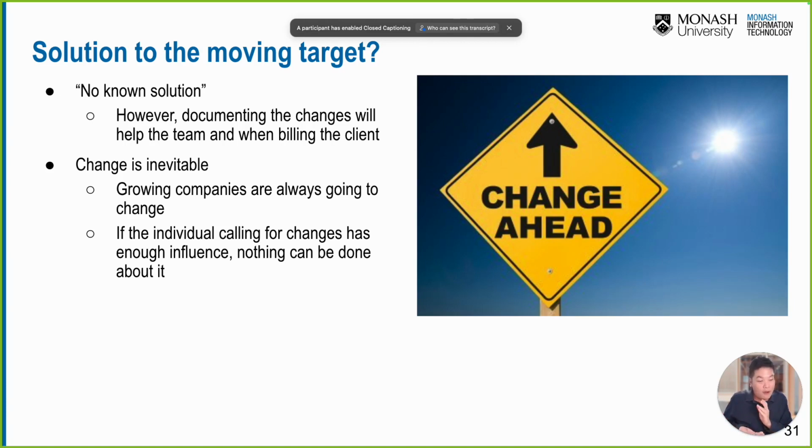We sign a contract for 100K already to develop the piece of software, but we still keep designing the prototype every day, iterating, refining, and it's not clear when we are going to stop. So at the end of the day, prototyping can be one part of the activities in the contract when we work in real-world scenarios. That means rapid prototyping is not the sole thing. It should be part of the activities during requirement engineering.